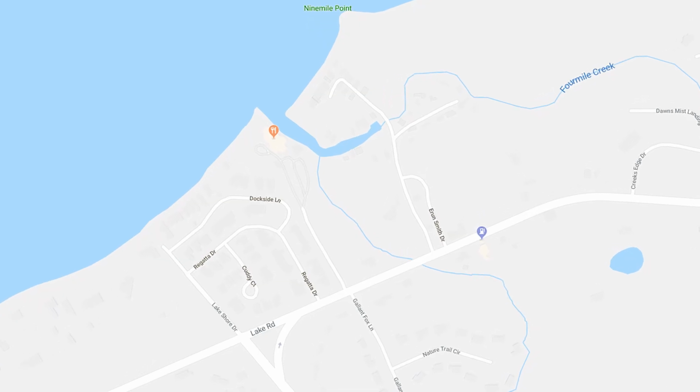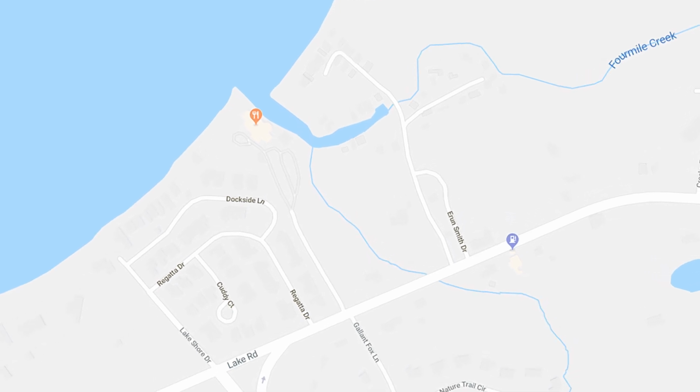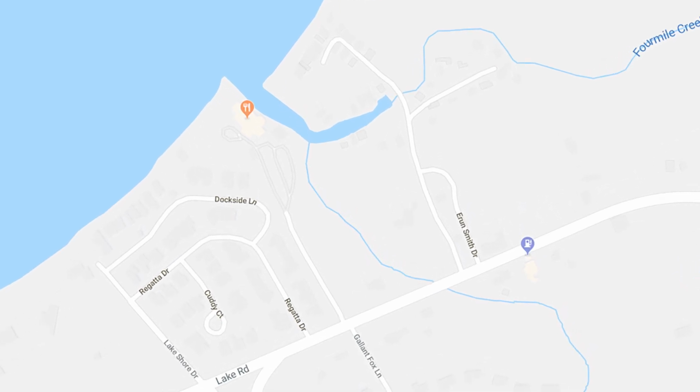Each application must include a location map. A variety of maps can be used, but they should show the names of local roads. Be sure to mark and label the project location on the map clearly.